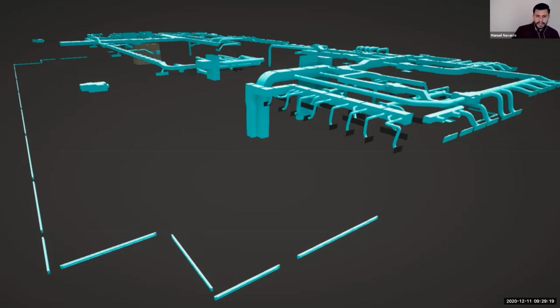Yeah, I was just going to add to that, typically we issue our drawings based off the model to the general contractors for pricing as a moment in time right before construction documents, just to do a gut check on pricing. And what ended up happening is that we issued the Reflect model in addition to our drawings, and we went out to bid for 5 general contractors, and almost all 5 were within range, like $5 of each other, which is very rare that we get that close of competition.